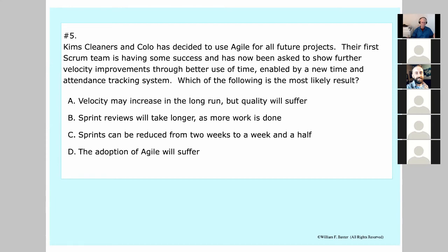In C, you know, actually changing the sprint from 2 weeks to a week and a half is a terrible idea. You really want it to be either 1 week or 2 weeks, or 3 weeks or 4 weeks, because you really want the same day to be the same practice. You're always doing sprint reviews on Friday mornings, and you're always doing sprint retrospectives on Friday afternoons, for example. So more of a battle rhythm. Yeah, that's it. That's exactly right.